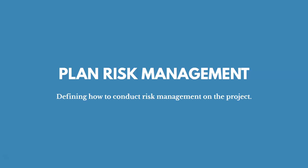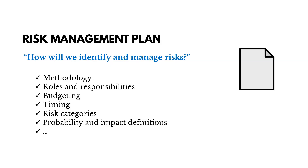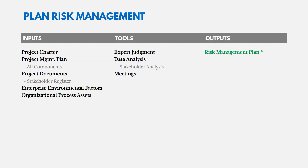The first process is plan risk management — defining how to conduct risk management on the project. Like all plan processes, you have the project management plan as an input and individual plans as output — in this case, the risk management plan. The risk management plan describes how risks will be managed, including methodology, roles and responsibilities, budgeting, timing, risk categories, and definitions of probability and impact. Tools include expert judgment, data analysis, and meetings.